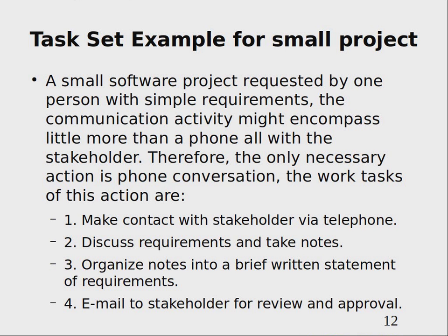And particularly for tasks, I hope that most of you already have some project management experience, and if not experience, then at least participation in projects. But usually a task is always with a start and an end, and with some description for which you can tell: is this task done, maybe it's in progress, or not done.